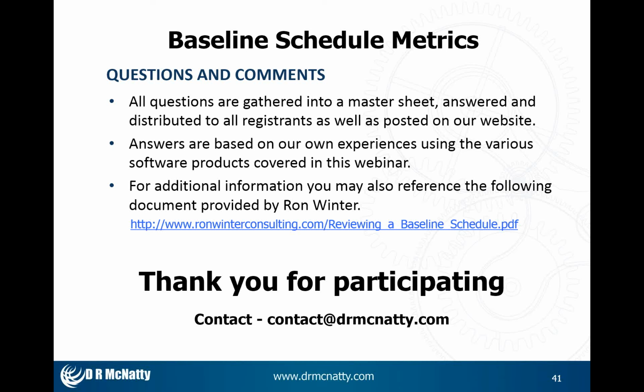And when I get to the point of detailing that down, I'll turn that original activity into an LOE, and then the detail will be A400.01, .02, .03, whatever, and they drive the summary activity, which still compares to the original activity in the baseline. So that is a best practice on preserving and keeping the validity of your original baseline schedule.